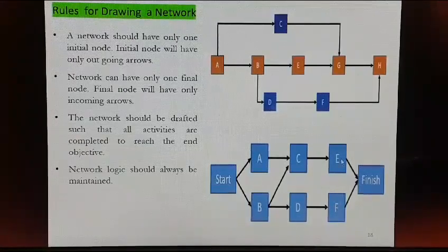Now if you leave it without connecting this final node, this condition will not be satisfied, right? So if you have two final nodes separately, you have to connect these two nodes by adding one more node like finish, and you have to connect it and finish it. Okay, I'll stop here.